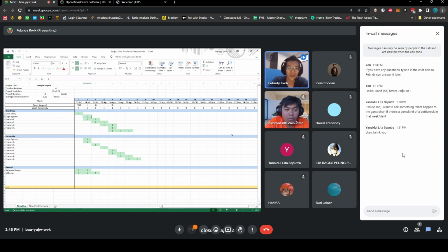If you need it here, but this only starts here because it has to wait for the database designs, you're going to be moving this backward one more week. Okay, or if you have something else to do before that, you do something else before that. But back end, front end, usually the server has to be done first. After that, you're going to do this.